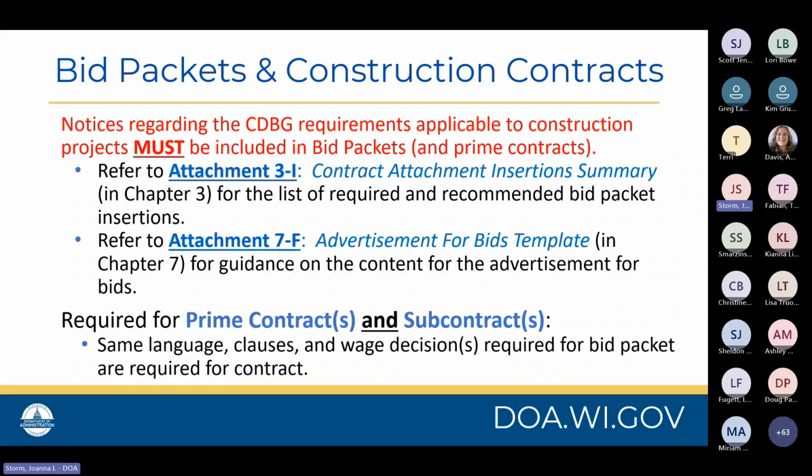Required for all prime contracts and subcontracts are the same language, clauses, and wage decisions that were required for the bid packet. So they need to be both in the bid packet and in the executed contracts.